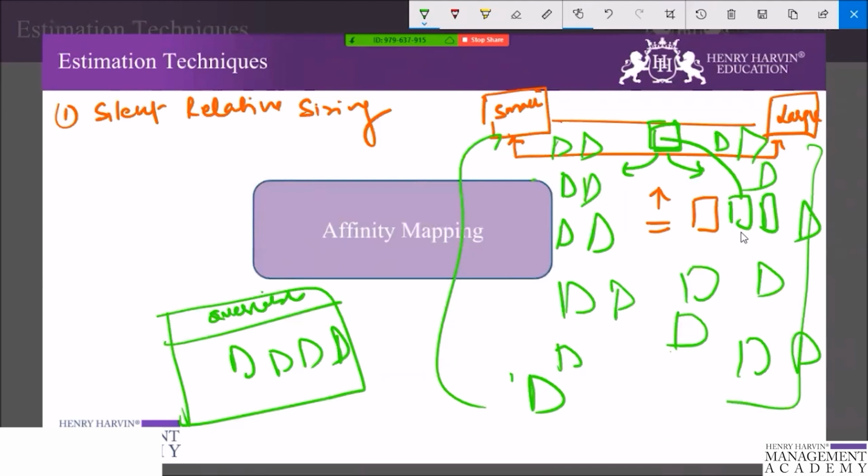So during this part of the exercise, you may see some design discussion going on, thought about product backlog items which are missing, and increased clarification needed from the product owner. So allow this to continue until the team begins to settle down and there seems to be little change happening on the wall. This may take 20 to 60 minutes. Let them do the work.